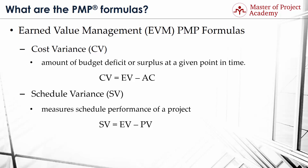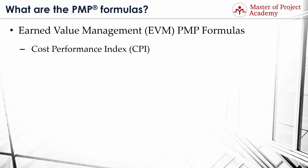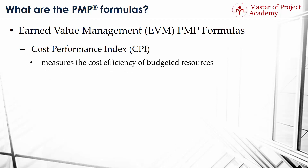PMP formula number 5: Cost Performance Index or CPI. One of the most common PMP formulas for control cost is CPI. It measures the cost efficiency of budgeted resources, expressed as a ratio of earned value to actual cost. Accordingly, its formula is: CPI equals EV divided by AC.